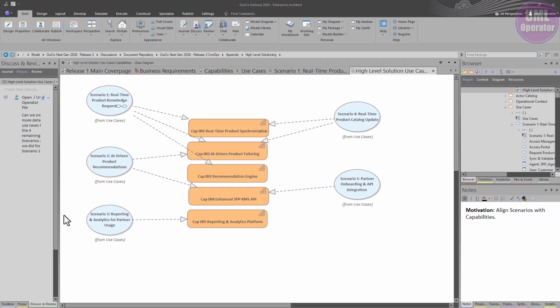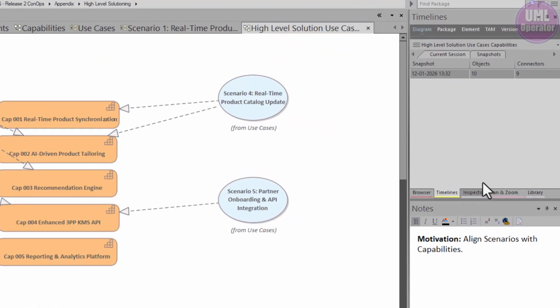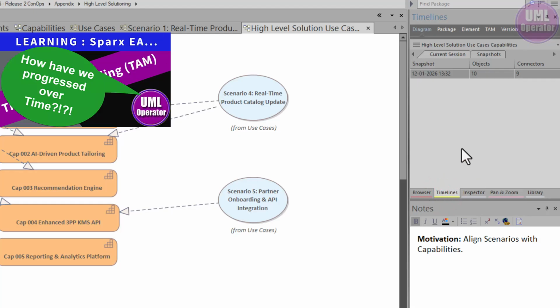The have-to comment was related to the project manager's communication plan, basically stating that every stakeholder, when leaving a particular model element, does a journal entry for the remainder of the team to understand where they left off. With the discussion, they can ask questions and collaborate at element or diagram levels with the rest of the team so that others understand where someone left off, what they're focused on, and what action items are needed to proceed.